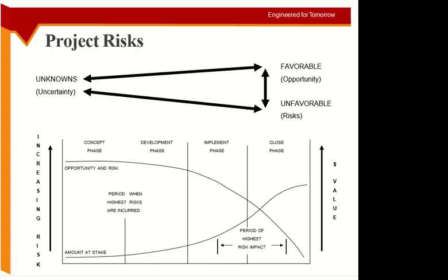But as the uncertainty is decreasing, the value is increasing. You can see the uncertainty decreasing. But if anything uncertain happens at this stage, it will have more impact because you already have invested more resources here. You have invested more time here.